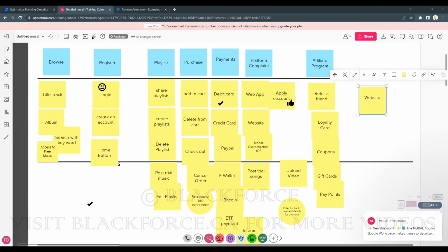So there are things the agile coach will be looking out for. Their sprint burn down chart. How are they doing? Are they moving their items or not? What is their velocity? Are they even following their velocity, or are they taking more than they can chew and not completing work every sprint? So there's a criteria. All agile coaches come together to determine criteria for maturity. So we have beginners, people in a steady state, level 2, level 3, level 4, I think up to level 5.